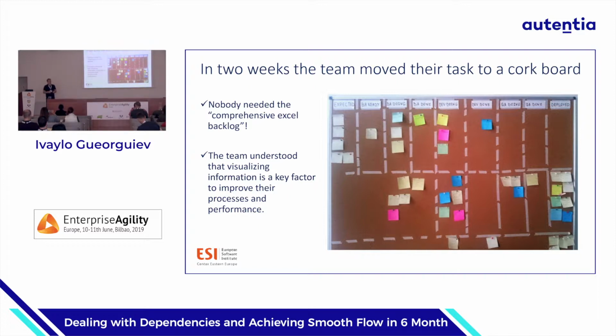They didn't know where is the Excel file. They didn't need the Excel file. Why do you think they did not need the Excel file? It's not because they have all the information on the tickets, not at that moment. Because they were visualizing the work, the workflow was visualized, and they were discussing it in each Kanban meeting every morning in 15 minutes.